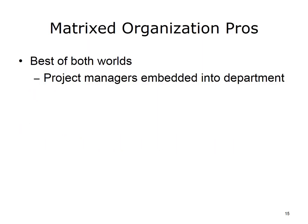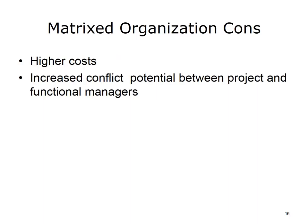The positive aspects of a matrixed organization include having the best of both worlds. Since project managers are embedded within a department, they tend to get more in-depth experience, whereas if they were on loan to that department, they may be coming into a project blindly. The negative aspects are higher costs because of duplication between the functional and project managers. Likewise, there is a possibility for more conflict between project and functional managers because of authority issues.